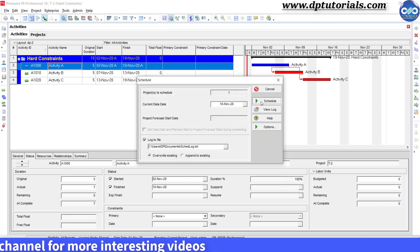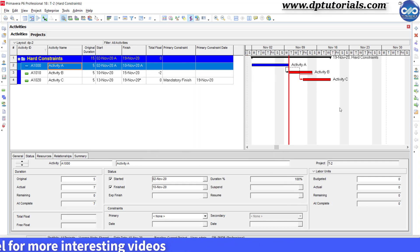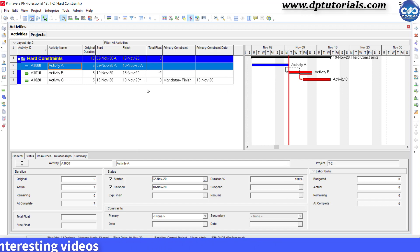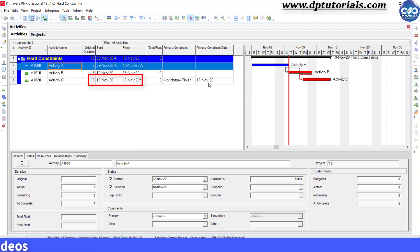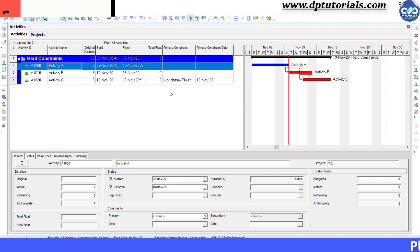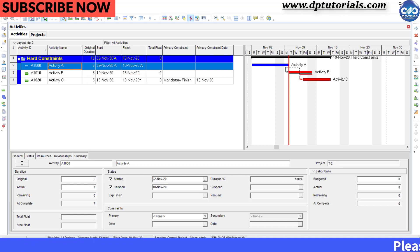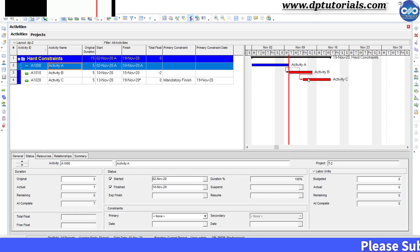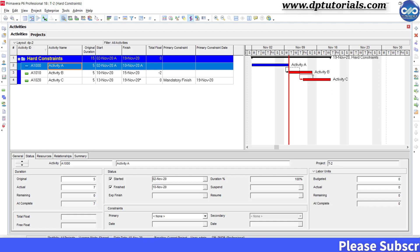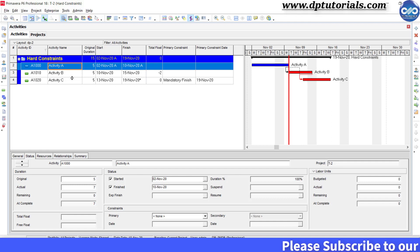You will observe that the activity C's dates are fixed and not changed at all. And also note that the activity C's start date is shown before the activity B's finish date. That is a clear violation of the relationship logic.